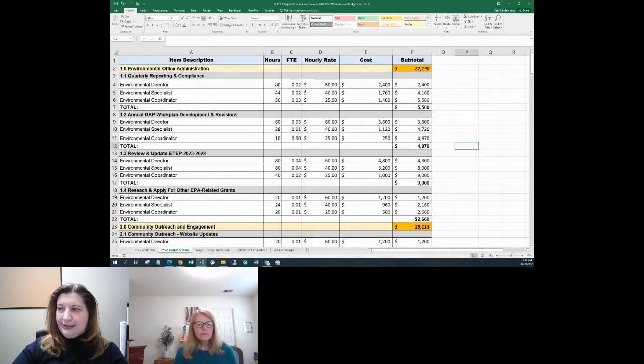Right. Or to decide if you can cut down on the hours just enough to make up the difference. At least you know what the total was. And if you can get close to that total again without taking away too many hours. I mean, if you're just talking a few hours, sometimes it's easy enough to tweak the hours rather than give up a whole commitment.